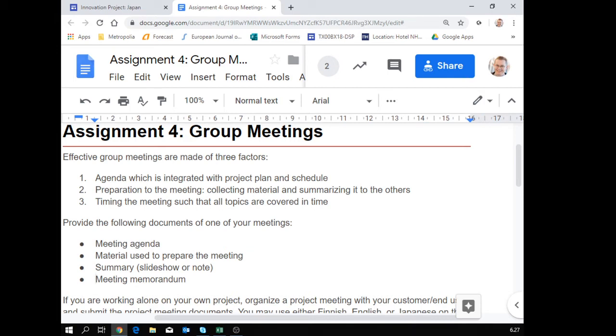Then planning for the next phase, meaning if you need to reallocate the resources somehow, that's done there. And then the last one is scheduling the next meeting. That's effective. In small projects, it takes 15 minutes. If there are more than 10 people on the project, then it takes about 1 hour when you do it effectively.